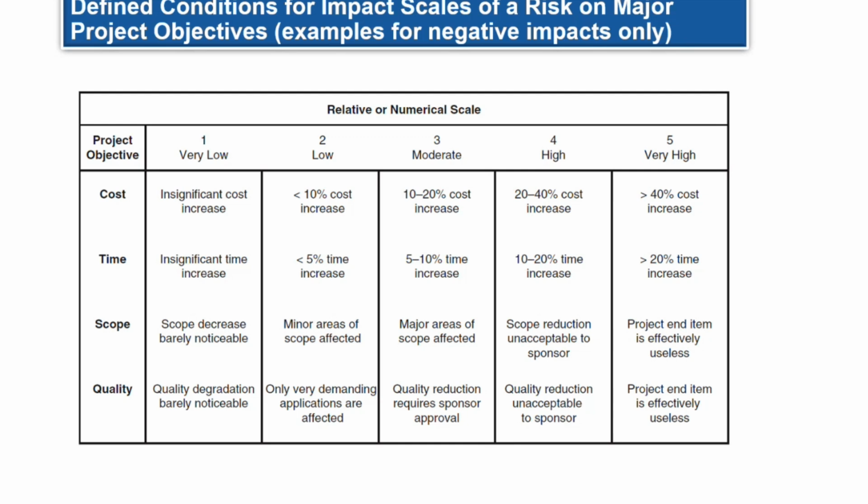Okay, the team as a group needs to have some specific measurements to understand what one means and what three means. That's used to measure the impacts of risks. And when measuring the impacts, this criteria should be looked at in terms of cost estimation, time estimation, scope, and quality. So these are some of the conditions and ranking criteria looking into the negative impact of the event.